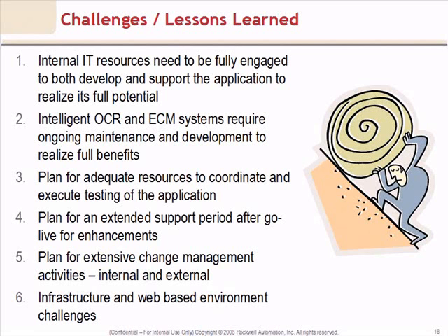Like any project, also the change management activities, both internal, so within Rockwell, as well as external in our supply chain, planning for extensive change management activities. This is something that we did do in the front end, but one of the lessons learned also is AP, again, is a fairly simplistic function, even though you do your internal communication around this process. It is a little bit of a different web-based environment, and it does take users some time to get used to things. So it's not only change management on the front of the process, but ongoing change management activities to ensure, again, you get the productivity and the accuracy out of this process.